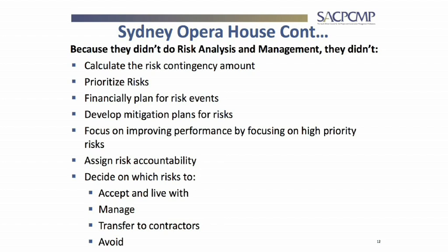You can claim back and say, Mr. Contractor, you'll finish it at your costs, because you're running late, I'm paying for it, which is fine. But I'm going to tell the contractor for every month you're delayed, I'm going to charge you my capitalization costs. So at the end of the day, we can't just, sorry? It's called penalties. But it's also capped.